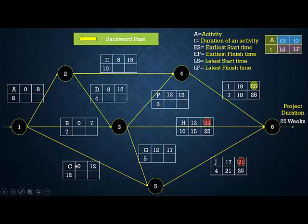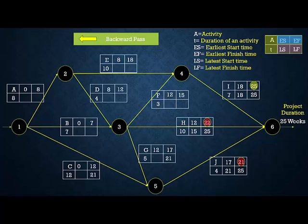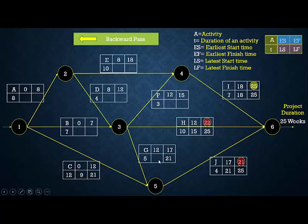Activities C and G each have only one successor, which is J, so their LF = LS of J = 21. LS of C = 21 − 12 = 9. LS of G = 21 − 5 = 16.